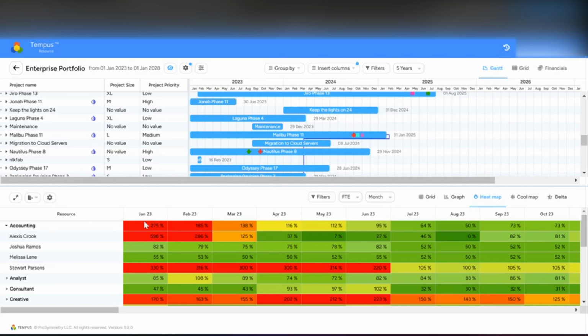Where is this number coming from? Well, what the aggregation level is doing is it is comparing all allocation versus the capacity of the people and giving you that allocation number. So while in this month specifically, 3 out of your 4 resources are not over allocated, but you have one who is, the team overall, or that role overall, is 116% allocated. So that is what this grid is telling you here.